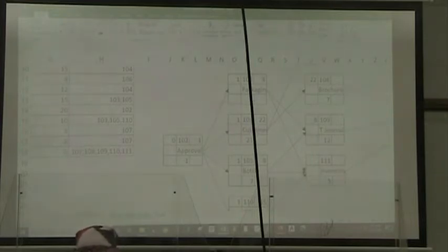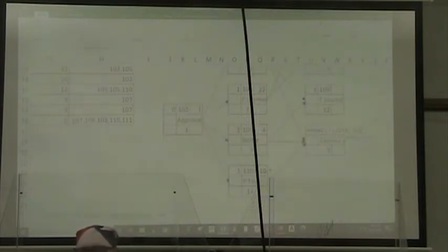All right, and then in producing wine to inventory, we also have a merge activity where we need to say equals max of our design of packaging, comma, our design of the bottle, comma, and our production test.